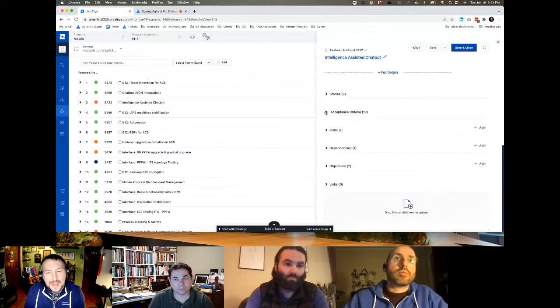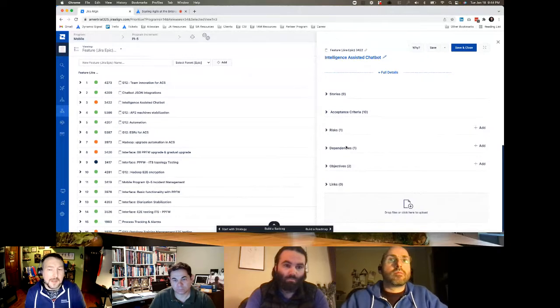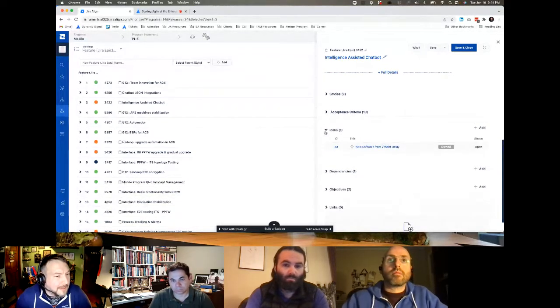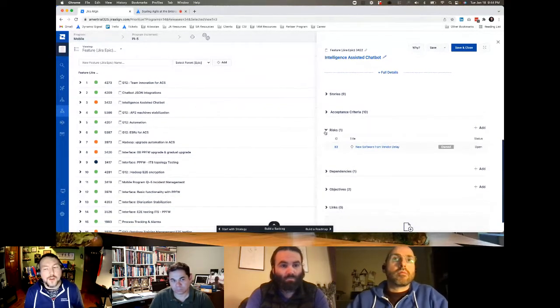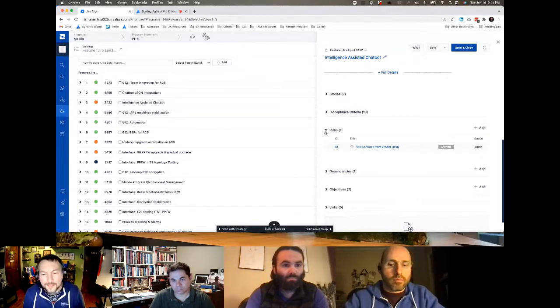And then through planning, a couple of things we typically ask teams to do is identify risks. Are there any risks that you have? Maybe new software from a vendor is being delayed. So we've created a risk that's going to follow what we consider the ROAM methodology. I'll show you a little bit about that in a moment.